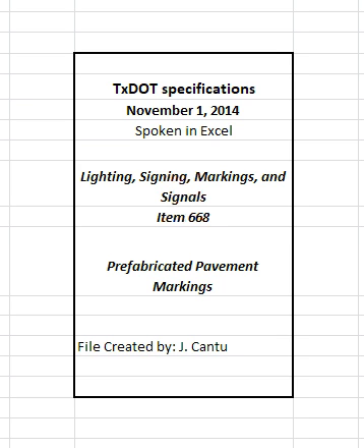This price is full compensation for cleaning the pavement by any means other than required abrasive or water blast cleaning or milling, furnishing and placing materials, and equipment, labor, tools, and incidentals. Abrasive or water blast cleaning and milling, when shown on the plans, will be paid for under Item 678, pavement surface preparation for markings.